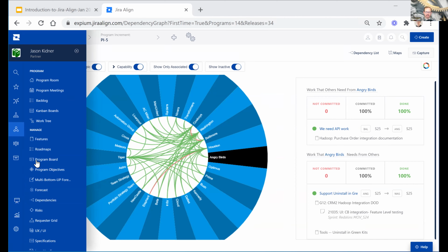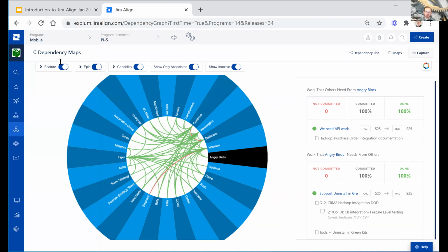So again, a lot of various features around your strategic planning, all the way from your strategies, from your long-term goals, down to themes, to epics, to features. And then those features would be linked up and synced up with Jira for the teams to start to work, decomposing those features into stories, potentially subtasks as well, over in Jira to do their work there.